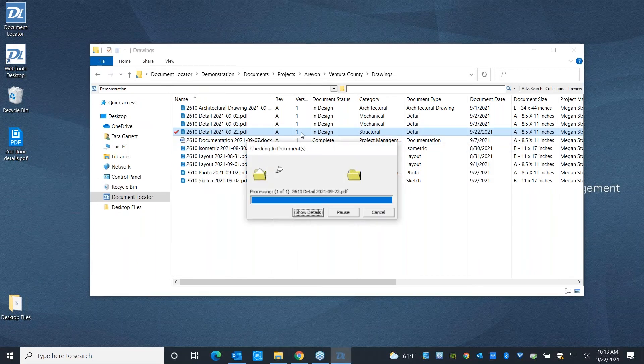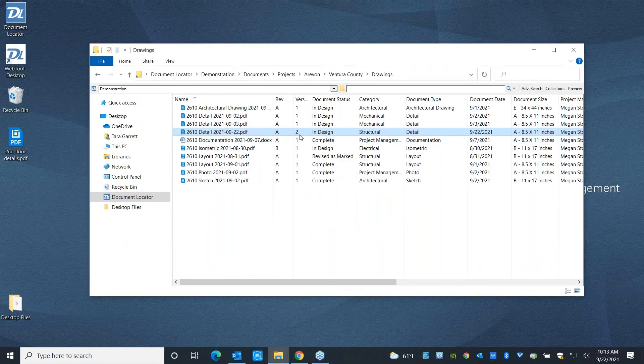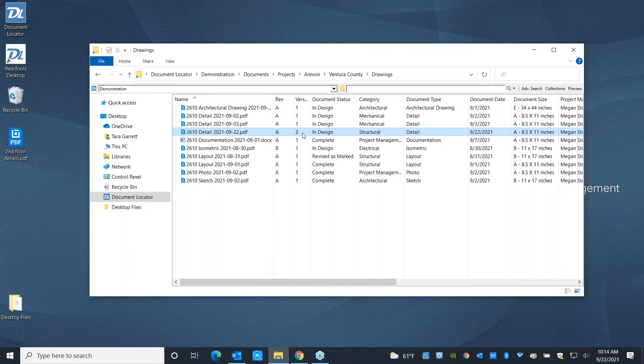That's going to release the file back into the system. And you're going to notice it's going to update this version number from one to two. You'll notice it didn't update the rev level. The difference between the version number and the rev number, or level in this case, since these are all alphabetical, is the version is updated every single time somebody checks out a document to make a change.